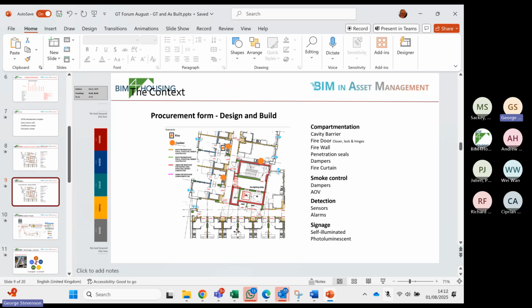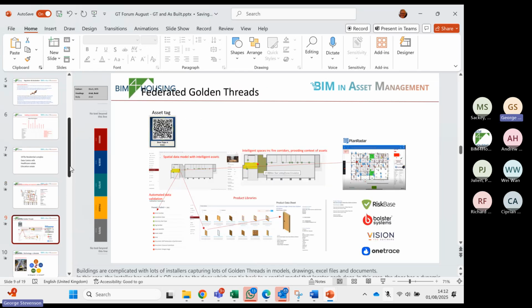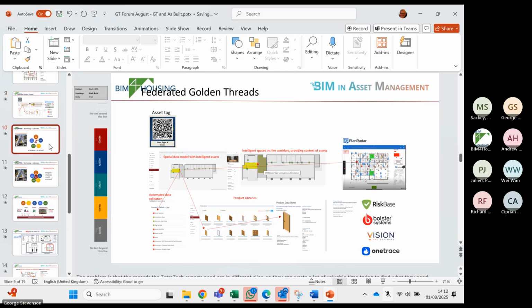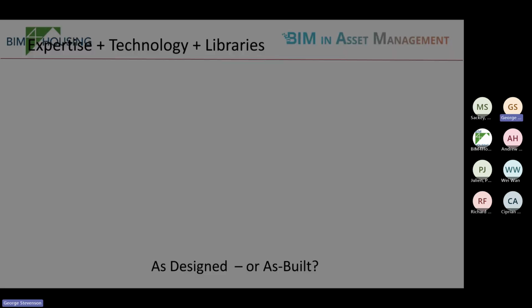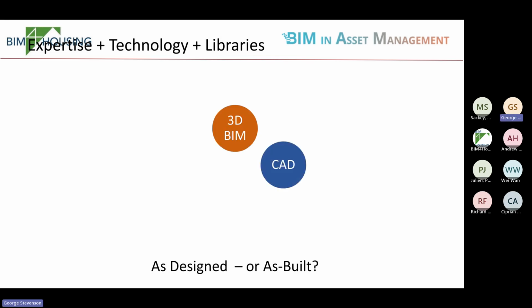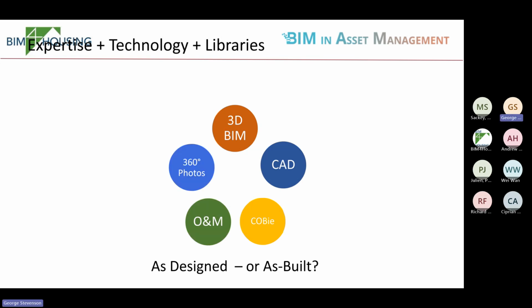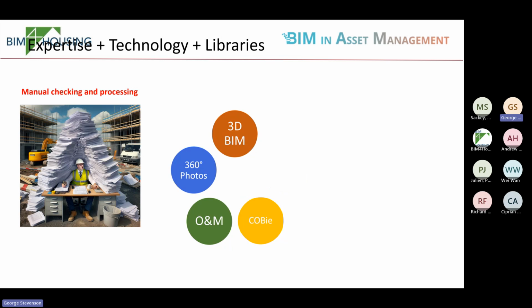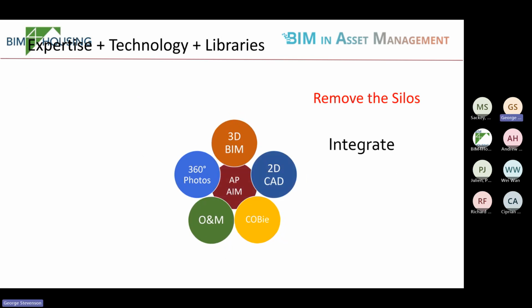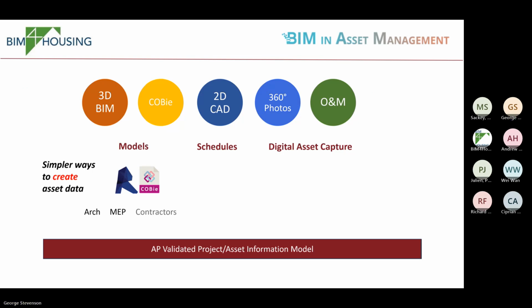And the other thing is putting this in some sort of context. So, for example, certainly for existing information, we might have a BIM model, certainly we'll have CAD data, hopefully drawings. Then one of the challenges is that all of this information needs to be pulled together so that we can then check it and audit it. And the way of doing that is if there is a model, then we can use it. But if people have just produced information in schedules, for example, technical submittals and things like that, that can then be added progressively.